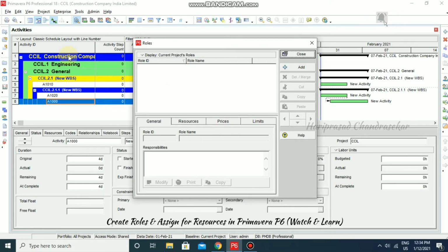You can add temporary roles during the planning stage of the project to see how certain resources affect the schedule, and once you finalize your plans you can replace the roles with the other resources that fulfill the required skills. So we have five proficiency levels in it, which we will see one by one later. Those proficiency levels are master, expert, skilled, proficient and inexperienced.